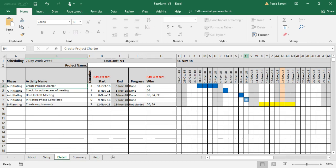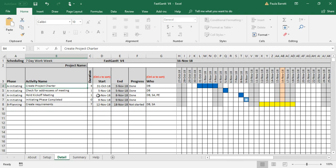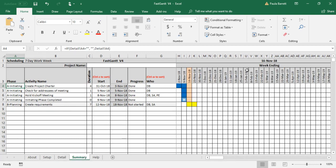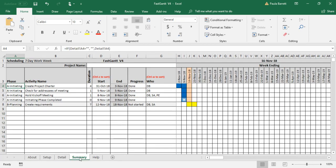Now this is the daily view and this is where we enter the information. Sometimes you want to get an overview of your schedule. So you can click on the summary tab and it gives you a weekly view. So this is the same information at a weekly view. This is totally locked. You cannot change anything here. It's just getting its information from the detail tab, but at some point, if you'd like to see an overview of how you're doing, this is a more printable report that you could print off and see on one page versus the detail view which would be way too much information because it's very, very wide.